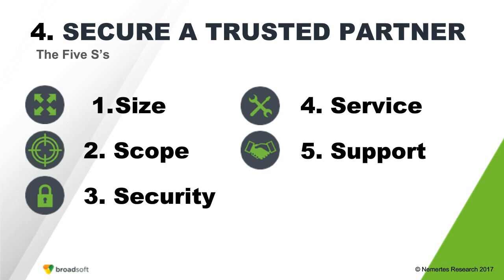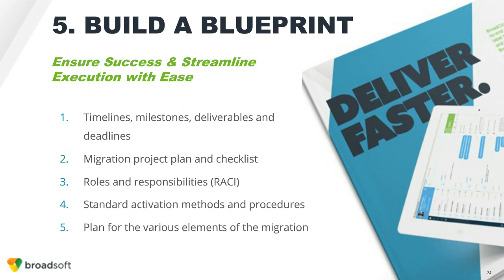Yep. So having a blueprint for a deployment is going to be really important. You'll need to have a series of project plans. So generally, what we're going to recommend is that you have a very granular per site project plan, and then also sort of a global strategic plan that looks at all of your different sites and orchestrating those together in a consistent service plan. You'll also need to figure out a framework for managing these projects.